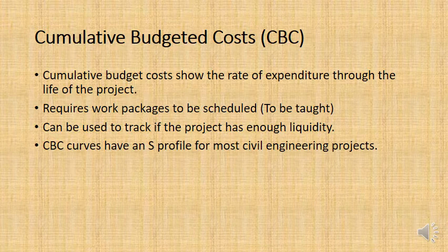Well, unless they have $10,000 in the bank before they start the project, the answer is no. They don't have liquidity. So there's no point in proceeding with the project, even though it's profitable, they cannot afford to do it.